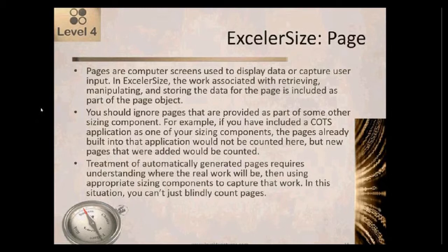Treatment of automatically generated pages requires that you analyze where the real work is going to be, then use an appropriate sizing component to capture that work. So in that kind of situation, you can't just blindly count pages.